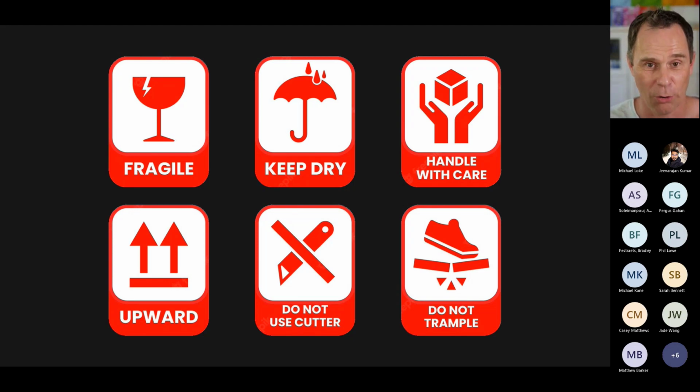You're going to have to re-estimate all your requirements, because those time-based estimates for that effort are out the window. You're going to have to do it all again. So you're going to have to spend more time in estimation. With story point estimation, you're not impacted if those kind of investments pay off. Use something called velocity, and velocity will just go up and your estimates will stay the same. This is actually down to the fact that time-based estimation is an absolute, discrete estimate, whereas what we're going to do with story points is relative estimation. So we're just comparing the effort involved in 2 different requirements.